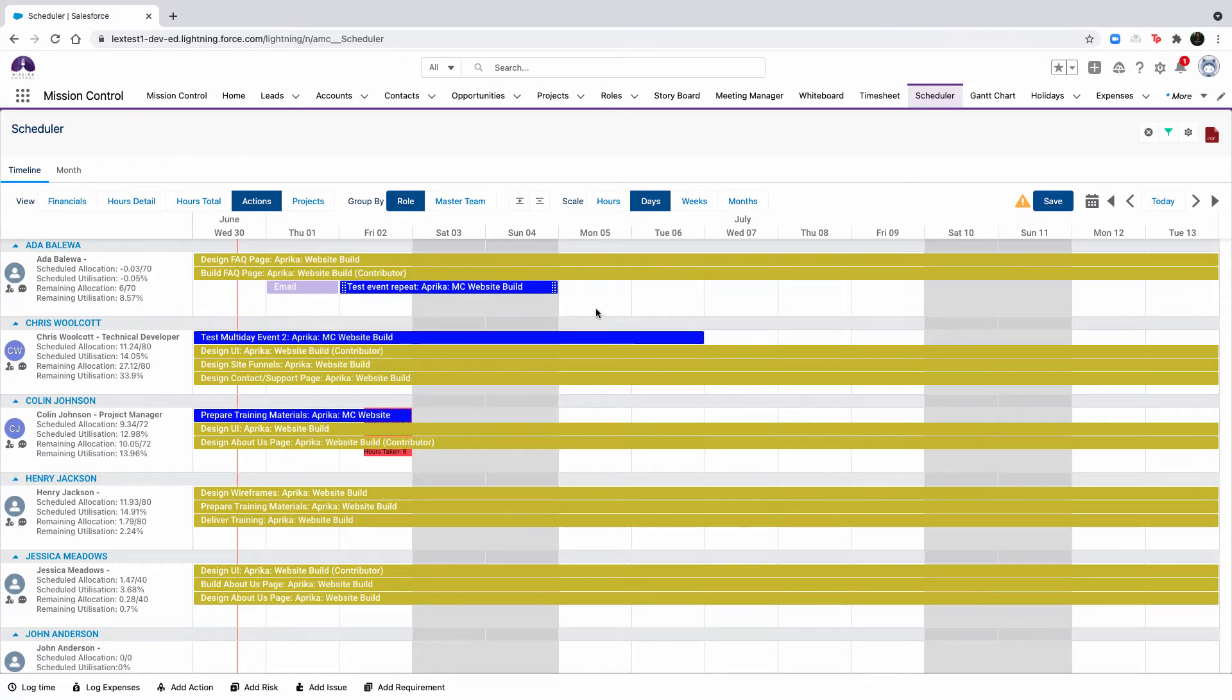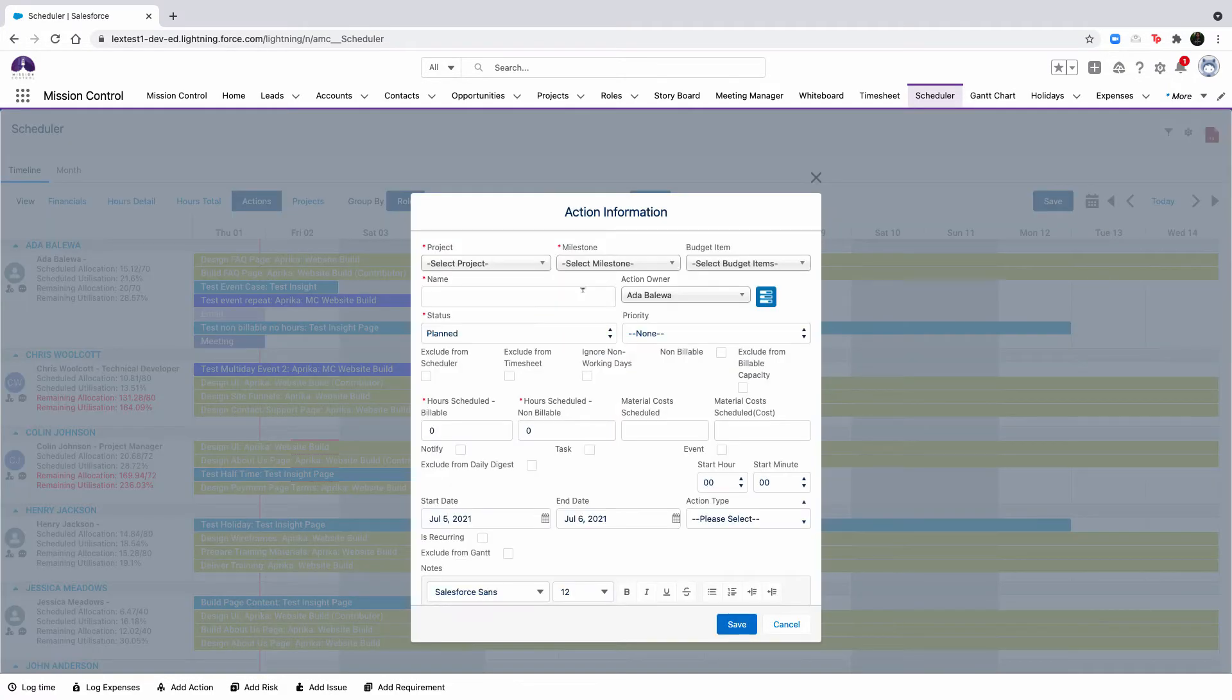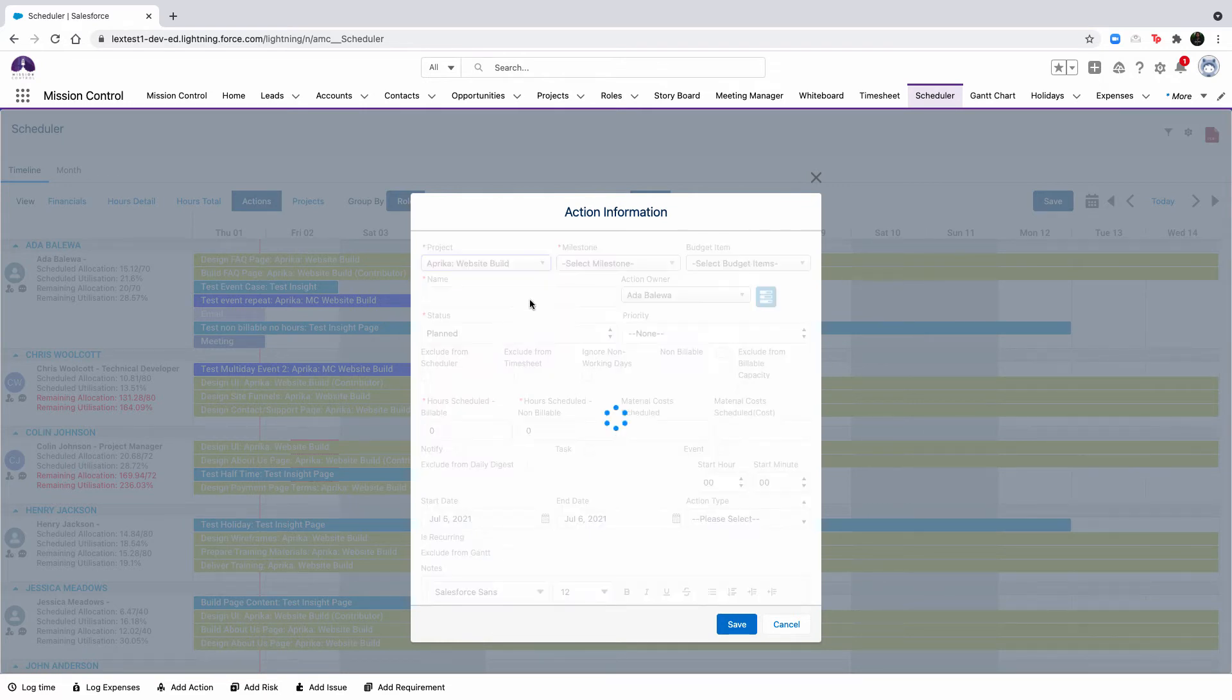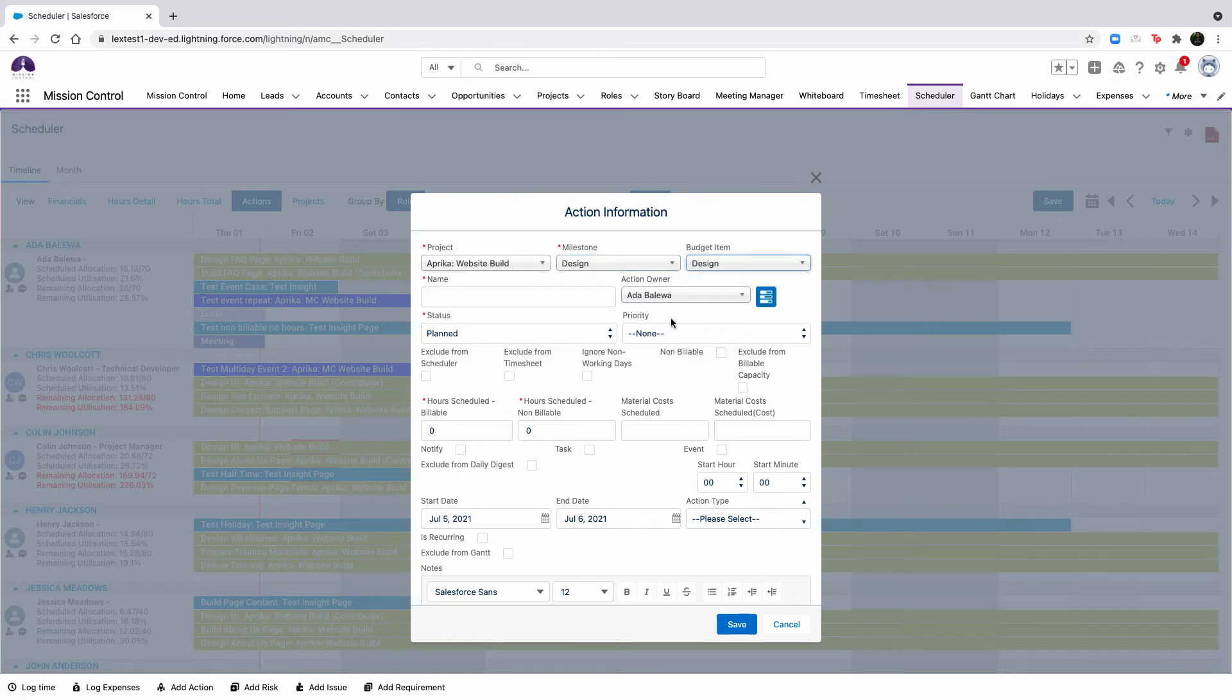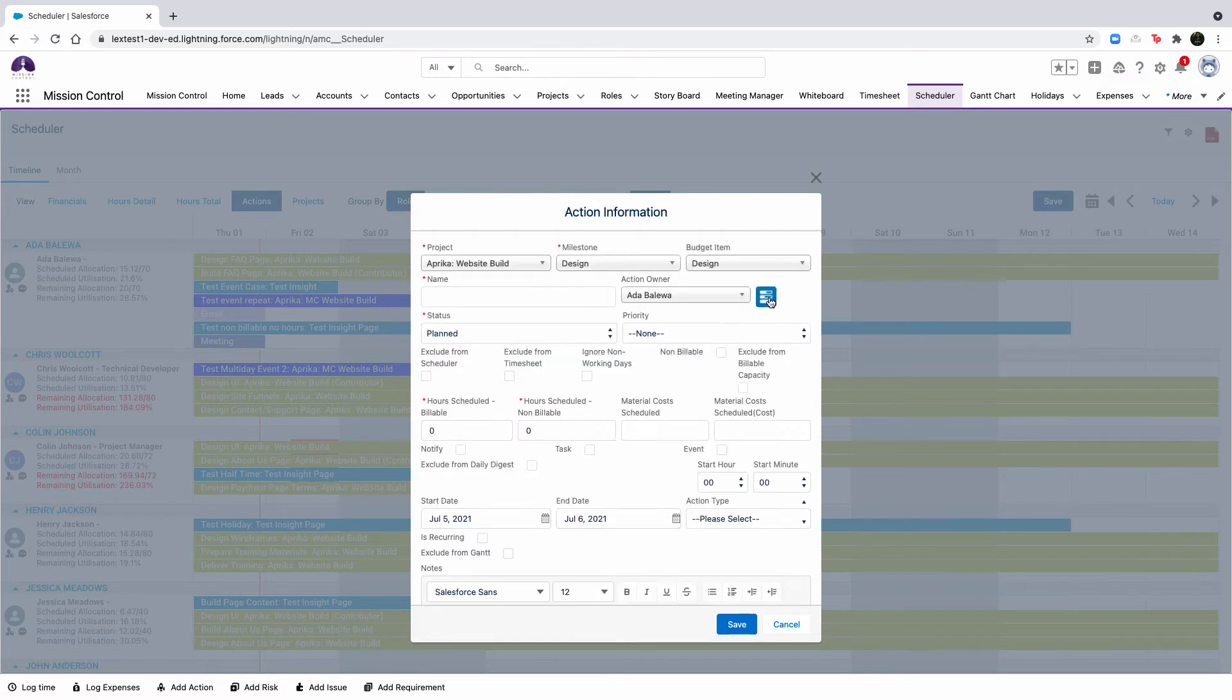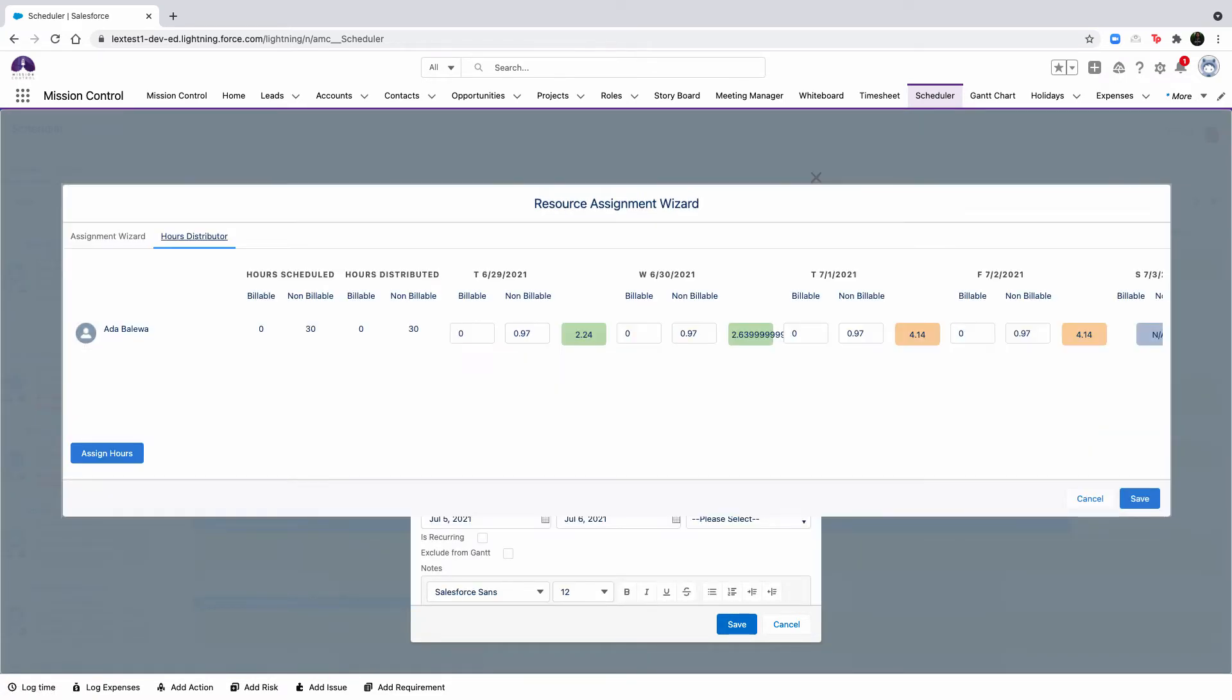To create an action, navigate to the role that will be the action owner and drag the cursor on the day that you wish to schedule the action for. This will then open up the new action component where you can create the action details as required. You will also be able to access the resource assignment wizard to include contributors, as well as access the hours distributor tab.